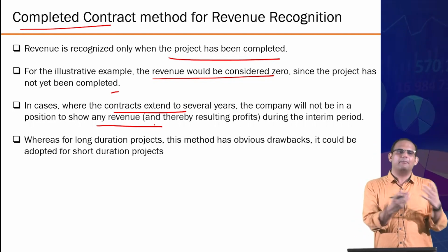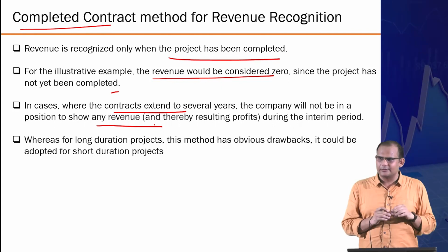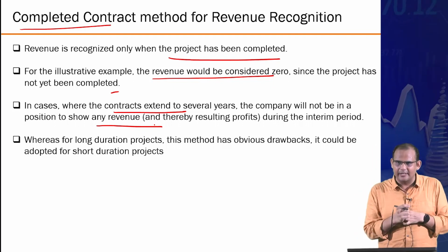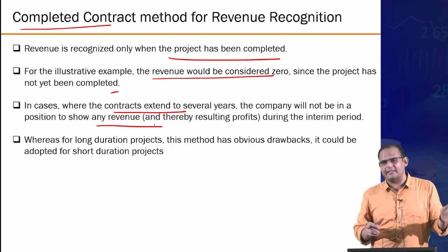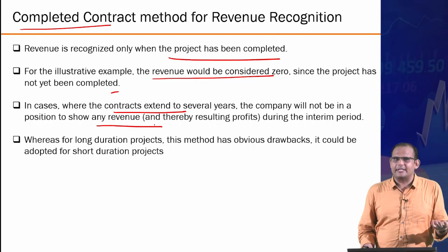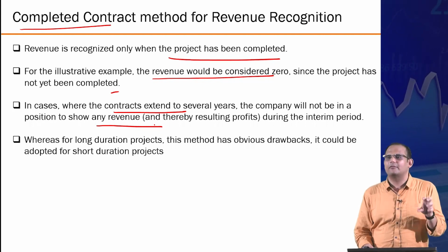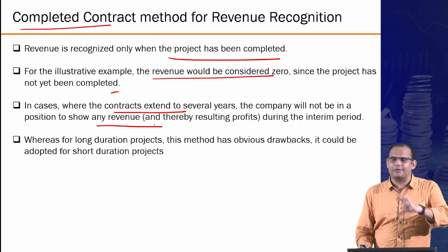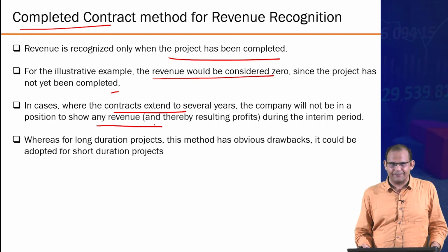So then you need to submit also the contracting account, the payment schedule, and so on. No bank wants to worry about that. So essentially, you need to have a more continuous method. This kind of method is becoming obsolete. More or less, these contracts are also going obsolete. For small contracts, still okay. Like if it's just a minor repair in your house, maybe okay, once the repair is done, I will pay. Meanwhile, everything is getting done by a small contractor. But for any large contract, you need to have more or less interim payments. Otherwise, it doesn't work, right?